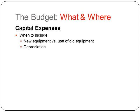Capital expenses are seldom included in operating or project budgets. The exception would be in a project budget where you have to purchase a piece of equipment specifically for that project. Then you would include it. Depreciation expenses usually are not included in expenses for projects, simply because you would have to figure out a way to cover them with income, which would just result in a larger allocation of operating expense.